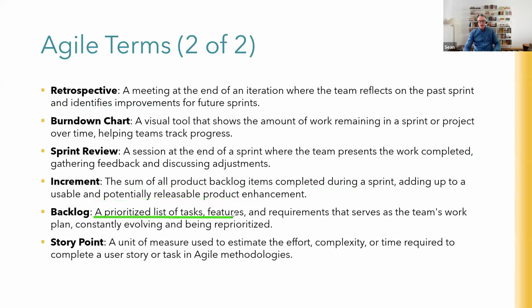The backlog is what the product owner puts together of all of the tasks and features that they require on this particular project. They will prioritize the work in the product backlog, and it belongs to the product owner. When the team is ready to pull work through to a sprint, they will go to the product backlog and take the top items or the prioritized items and pull them through into their sprint planning session, or maybe onto their sprint backlog. So you've got the product backlog and the sprint backlog there too.